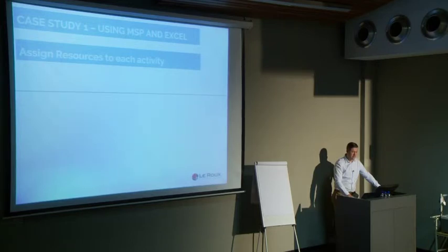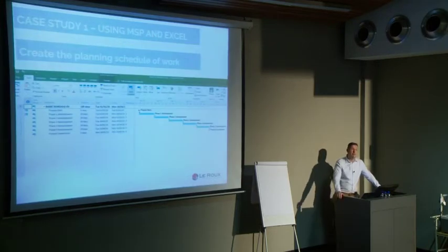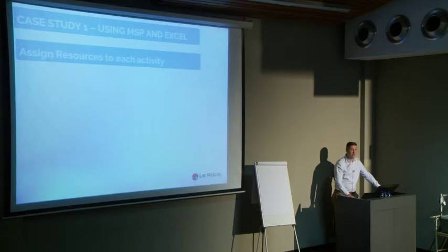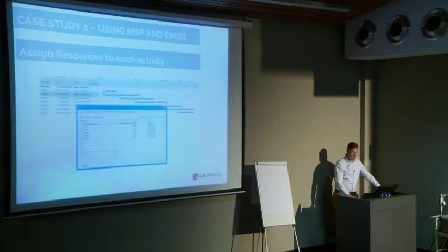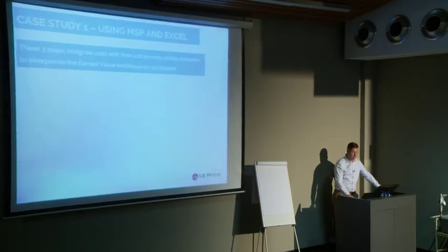It's each one of those activities. You agree? That's why scheduling is so powerful. And it's more than just an inflated to-do list. So it actually shows us that we can tick off those activities and ask the question, did we complete this activity, yes or no? So those are the measurable units. We've loaded them with cost over time. So we have the integration.